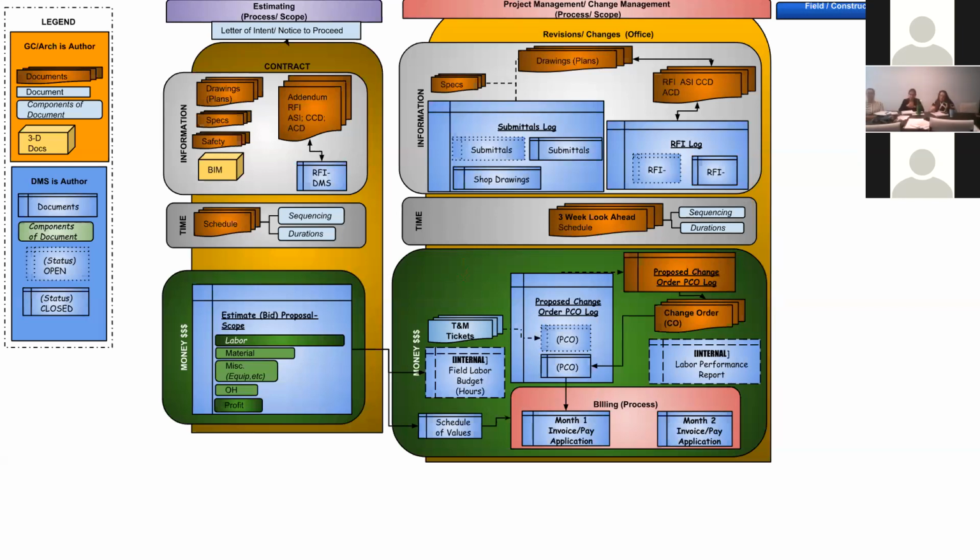And depending on how soon or how fast this goes, sometimes T&M has to be batched by week or month by month, saying, hi, here's all your T&M tags that happened in the month of January, and here's all the T&M that happened in the month of February. And the general contractor wants it broken out. Well, what's this issue for, and what's this issue for? So it is a tremendous amount of administration work to manage the T&M tags. And that's why it's usually more beneficial for us to do estimates than it is to do T&M.